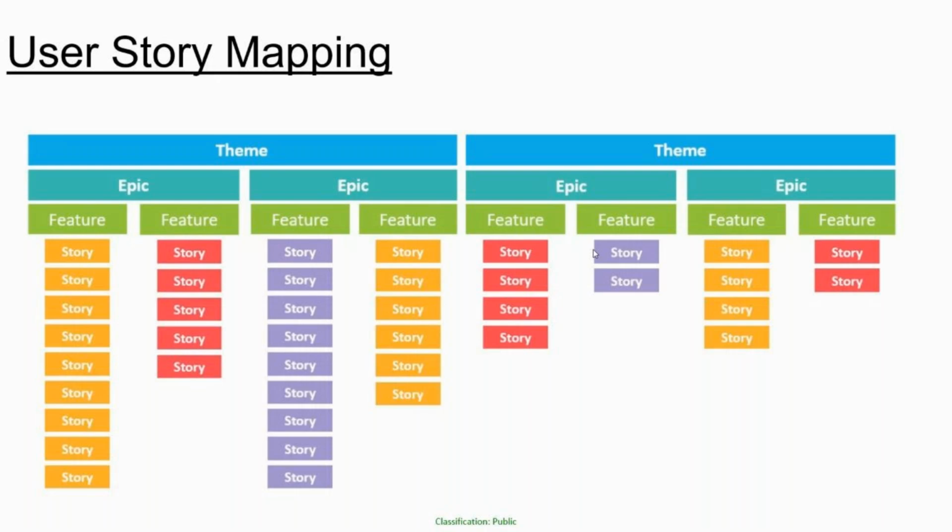Okay, so in this folder you have 10 user stories, meaning 10 Word docs right now. And now when your sprint one is starting, what do you do? Out of these 10 user stories, you pick up the high priority ones, which could be like the top four or top five, right? So how do you do that? So that is known as your,